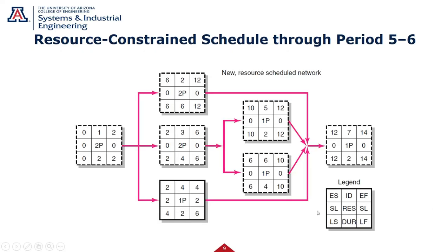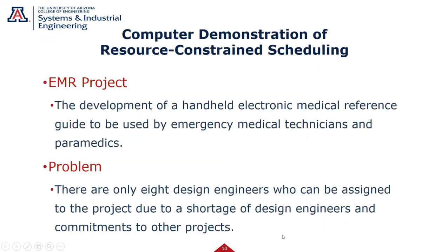So now what else did we do, though? Because before we only had 1, 3, 6, and 7 critical, I now increased that and made task 2 critical and 5 critical. So I went from just 4 of these critical to 5, 6 of these critical. So that's going to happen when there's resource constraints. So boss, I changed this from 12 days to 14, and I now have more critical paths on this to work. It's going to happen, but many times you're resource constrained.